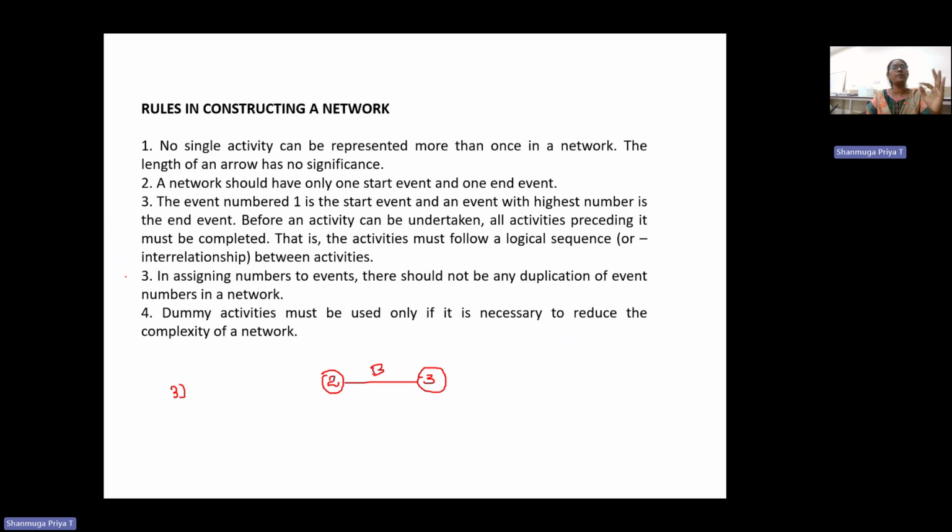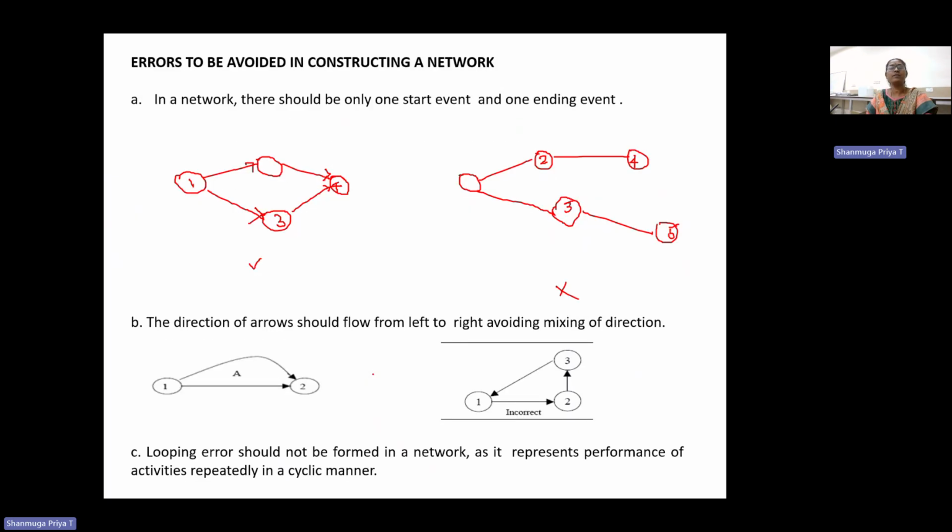The third point is that the starting event number should be lower than the number of the ending event. So the end event number will be the highest compared with the start event. Assigning two events should also not be duplicated. Dummy activities I will explain next slide.